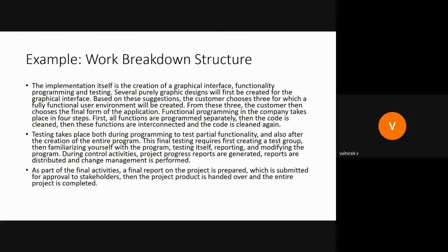Because if you let it be, you will find out after half a year that nothing is being done and that ending in time will be extremely problematic. But if you find out after 3 months that nothing is done, you can start to do something about it and you will still have time to finish in time.